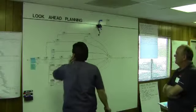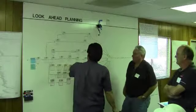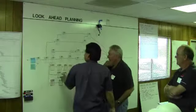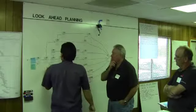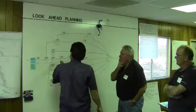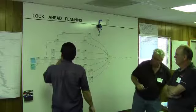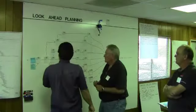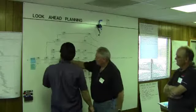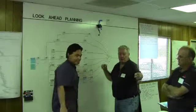What constrains me is that if this right up here doesn't get done, I can't do none of my stuff. Like if these walls right here — install wall panels — if I don't have these wall panels installed in 209 and 210, then I can't lay out. Where's the hallway coming in? I can't lay out this stuff.